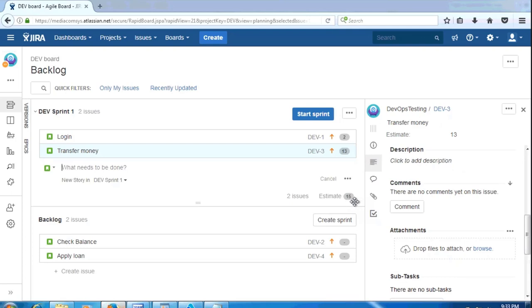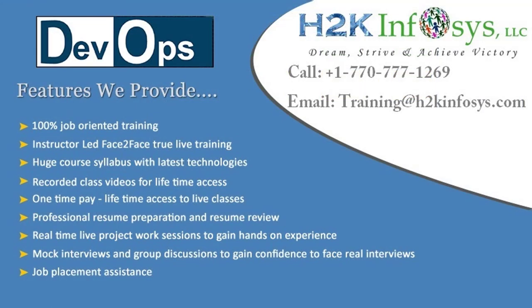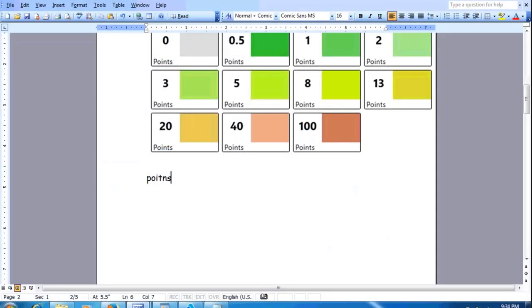That means you planned, that is your estimation, you're going to accomplish 15 points of user stories in the next 2 weeks. Then obviously you're going to start working on the project, right? Then what happens? So you planned, let's take this example, 15 story points. But at the end of the 2 weeks, you are done with the first sprint, and you accomplished, say, 10 points. That means there is something left to be done on those user stories.